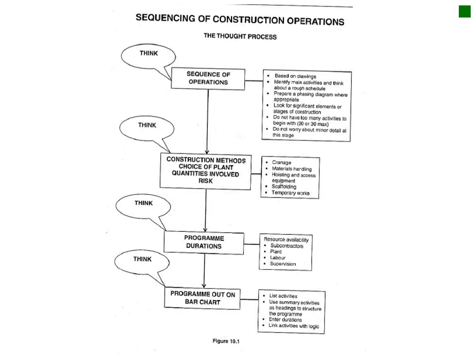You will always see that line whenever you look at the facade of the building. Figure 10.11 is a very important slide — whenever you do your sequencing, you have your sequence of operations, then your construction methods and choice of plant, then your program direct durations, and your program put out on a bar chart. This is more or less the process for scheduling. If you use programs like CCS or Microsoft Project, these items can take place fairly simultaneously — you do not have to complete the first three items before developing your bar chart. You can sequence items, look at methods, put in durations, and link items to produce your bar chart.